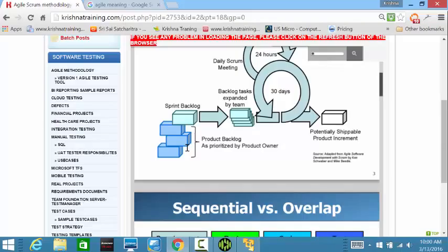Technically, it's not available. But the Scrum methodology says that when you say requirement one is complete, or the sprint is complete, it means testing should also be completed for that requirement. If the testing is not done, you cannot mark that particular user story. Sprint one has user story one, right? You cannot mark that user story as complete, saying that you are done. No, you cannot. Definition of done means testing also needs to be completed for that particular user story.